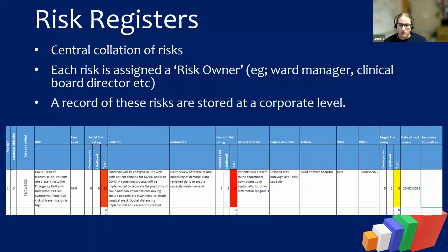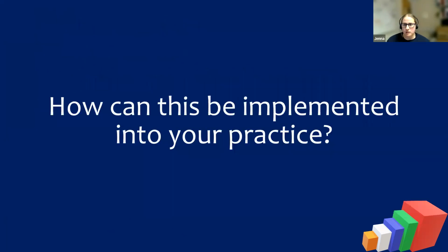It remains current for 12 months on a risk register after being deemed achieved. That's because we need to make sure that we're reviewing it so that it doesn't become a risk again. It reinforces the fact that risk management is a dynamic process and that we're constantly reviewing.